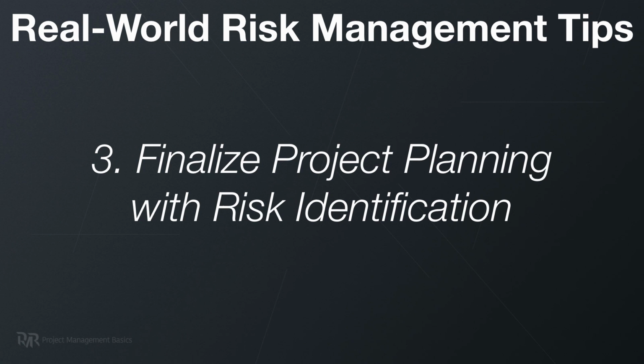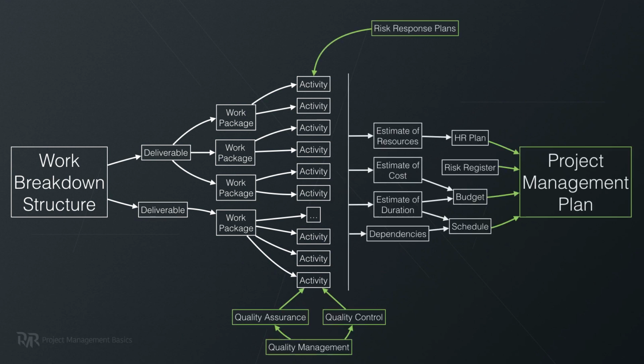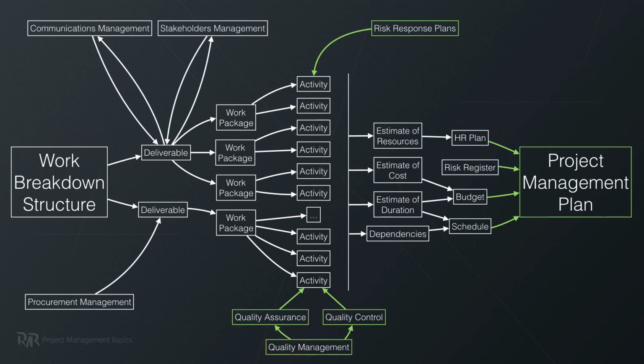Third, there is a point where you need to put the most effort into risk identification and risk analysis. So at some moment you'll create the drafts of schedule, of budget, your scope, then HR plan, and so on and so on. So you will have all the subsidiary plans for your project. So before finalizing the project management plan and showing it to the clients, you do want to show your subsidiary plans to your team and some subject matter experts, and hold a brainstorming session to identify the risks based on the drafts of your plan. And here you as a project manager will identify much more risks because you will have the bigger picture of the whole project and the plan.